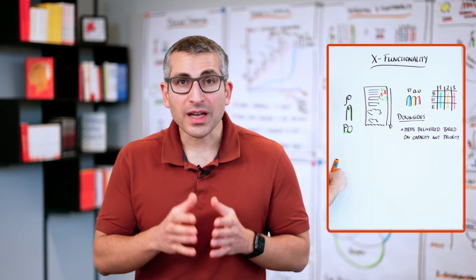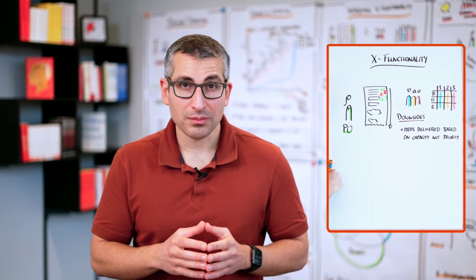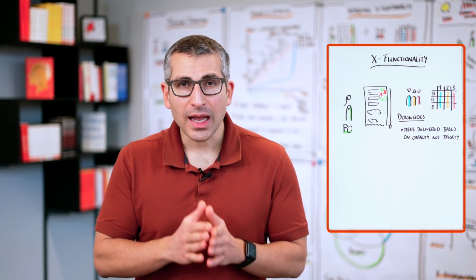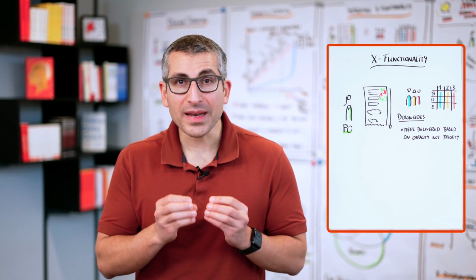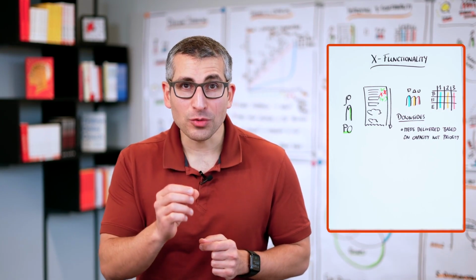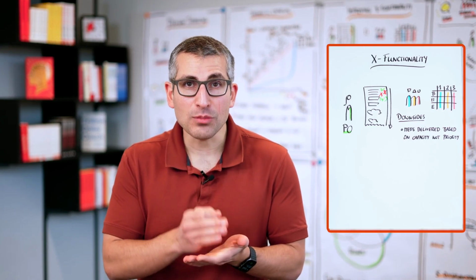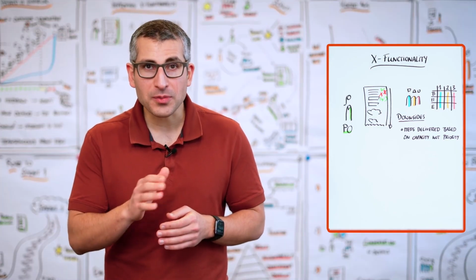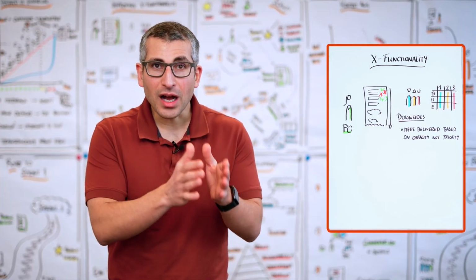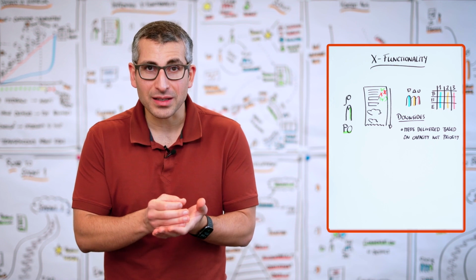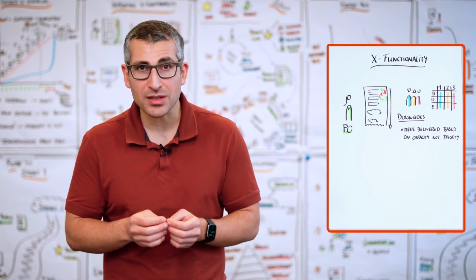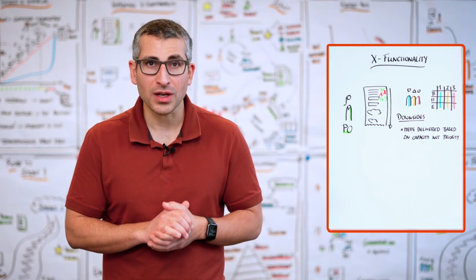If we don't dilute our definition of done, so quality assurance and testing is still part of it, how much work, how many items can that group of people actually move to done in that sprint? If you're saying 0, you're absolutely right. Because none of the other 2 has the ability to deliver or to do the tests and the quality assurance necessary according to our definition of done.